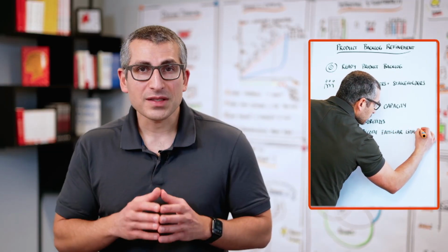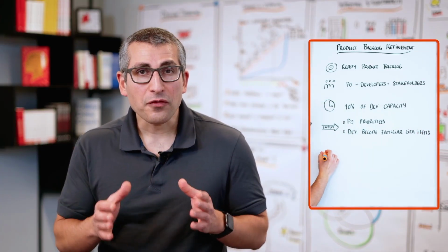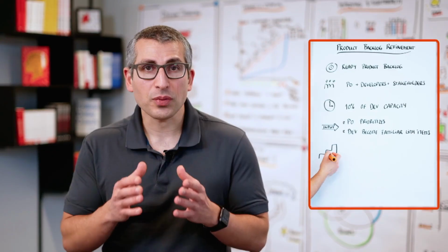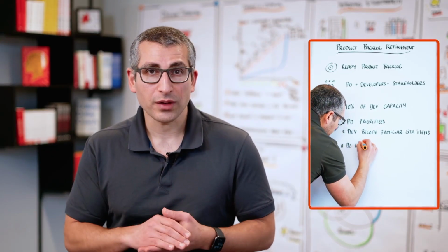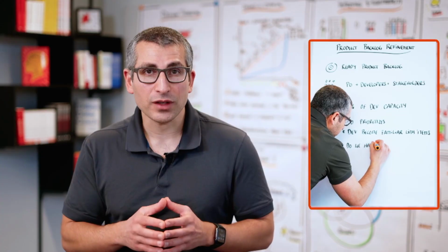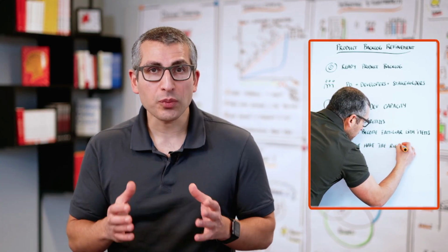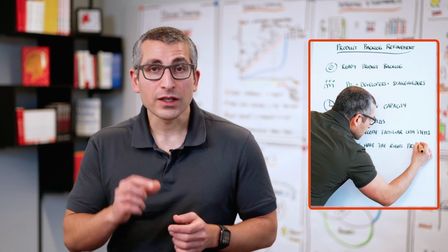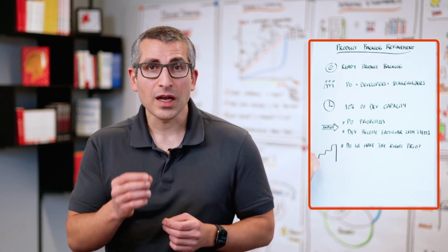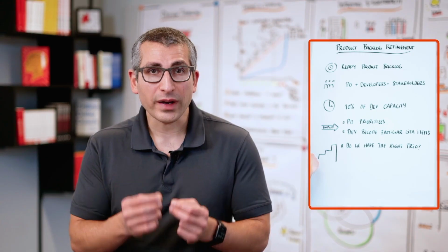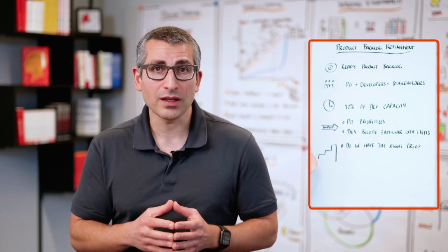The refinement itself is usually conducted in various steps. The first step is to challenge the priority. Does the current order of items work, or are we not accounting for technical dependencies? If not, how can we reprioritize the product backlog so that it makes sense in terms of value delivery towards our customers, but also covering or accounting for all the dependencies that exist between the individual items.